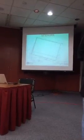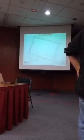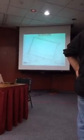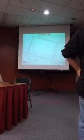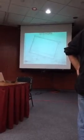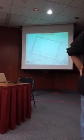On the site work, this is your turf field. Work's begun on that, as I showed you. The storm lines are in. The infiltration basins are in. The subgrade, the base that the turf field's going to go on, is ready for a proof roll. I don't think we're going to have any soil issues here. So it's looking at the beginning of April. There's going to be a flurry of activity in there, getting ready to put the turf down. They're projecting they may be able to give us that turf field by August 1. If everything goes well, they'll be able to have that for your summer, your fall sports.